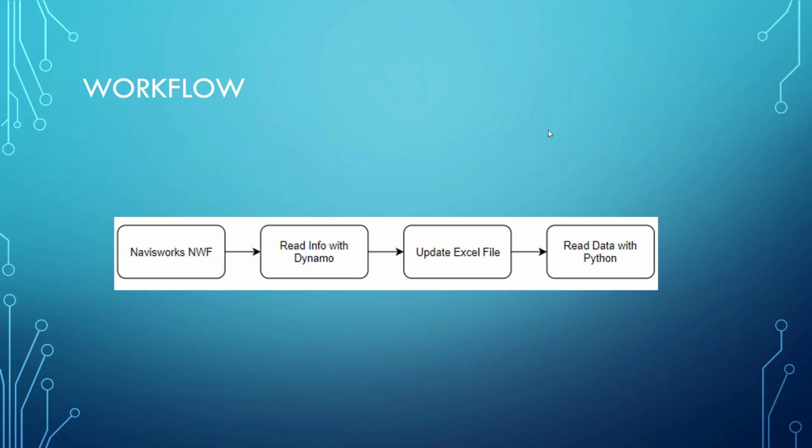We'll read that info, so the clashes that we make, we'll read the info, just the total count in this example, but hopefully I can build something that can individually look at the clashes, and then that way we can report discipline-specific clash numbers, and then get those for an entire company, which is really cool because then we can start finding correlations in like RFIs, reduced RFIs, reduced change orders, and so on.